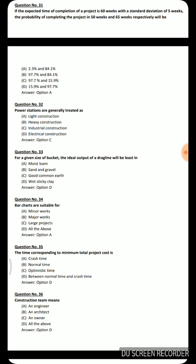The formula to apply is z = (Ts − Te) / σ, where σ and Te are given. Calculate z and refer to the probability table to get the corresponding probability values.